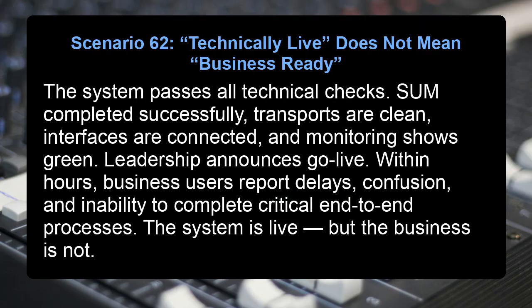Scenario 62. Technically live does not mean business ready. The system passes all technical checks. SUM completed successfully, transports are clean, interfaces are connected, and monitoring shows green. Leadership announces go live. Within hours, business users report delays, confusion, and inability to complete critical end-to-end processes. The system is live, but the business is not.